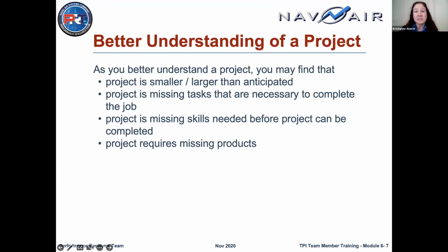But in the course of designing the test fixture and doing the analysis, we realized there was a much simpler approach, and it didn't require any moving parts. We could get the right rates on each axis in a fixed position just by varying the speed. So that made the project a lot simpler, a lot less expensive, and a smaller effort. So we realized we planned stuff that we didn't need to do, so we pulled it out of the plan.